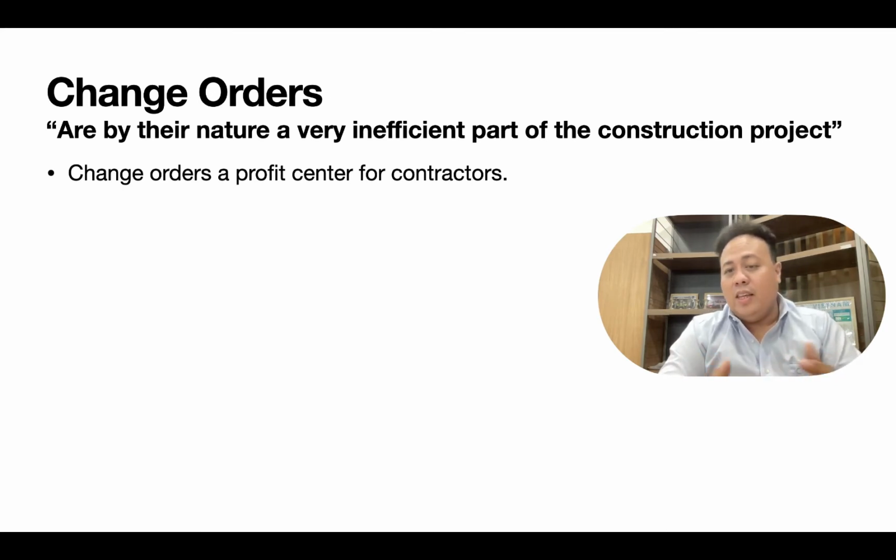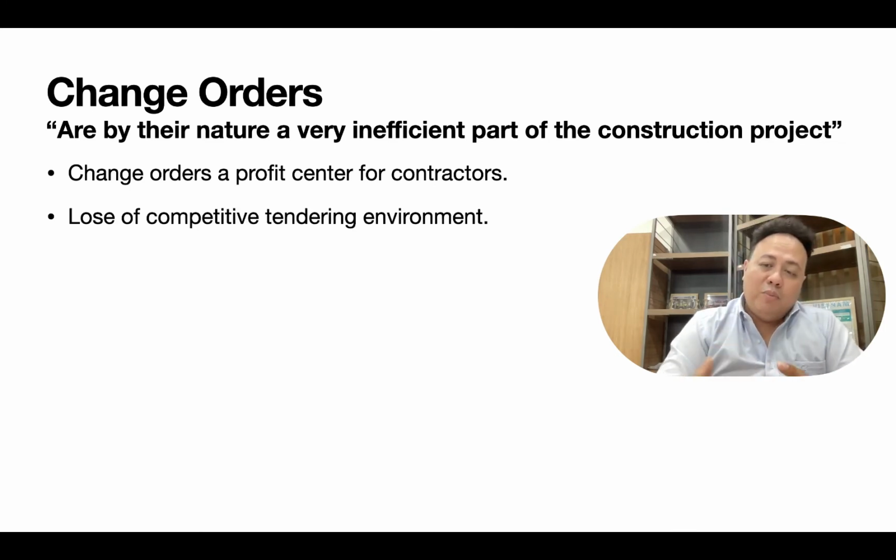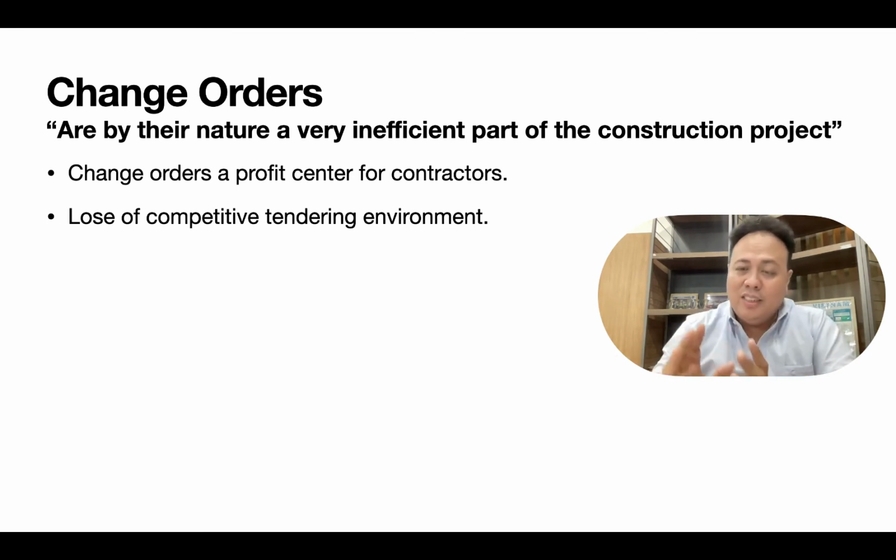If they think they have enough time, or they can compensate with time, to accept the change order, then it can be a profit source for the contractors. Once you have a lot of change orders, or suddenly you change the design, you lose the competitive tendering environment. It means that whatever your original budget, once you change, they have to resubmit a new costing.